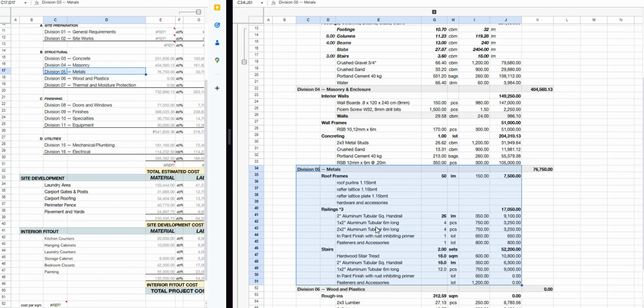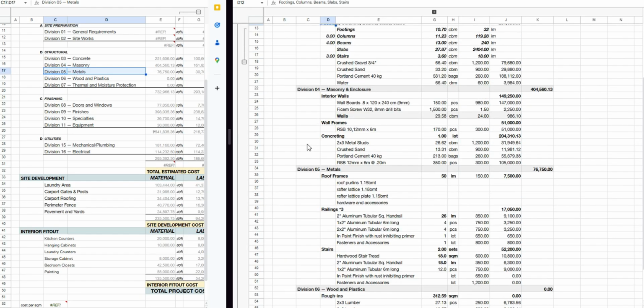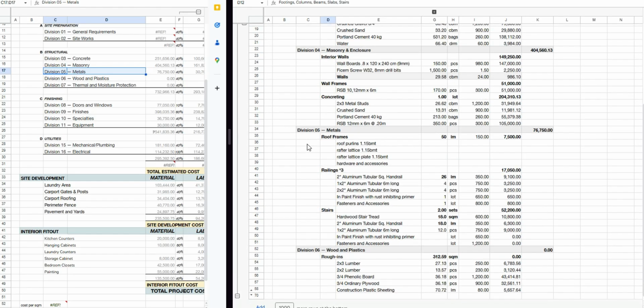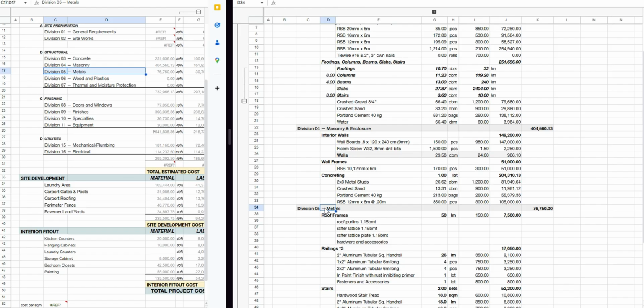But for the scope of work, actually our metals for reinforced steel bar should be done before concreting of the columns. That's why I say it depends really on what it's used for. Because if you show this to the client, they will not understand this because it's just a bill of materials. It's just listed all the materials needed, but it does not necessarily mean that you will do the concrete first before the metal in actual construction.